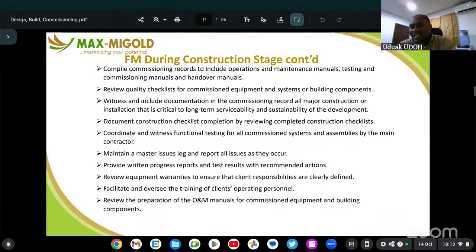It makes it easy. So that's why you need to look at the project contracts, the document contract. What do they require from us? You have to start building those documents right from the design stage, so that during construction, those documents continue, and then we can see how to update them over time. Then it will be easy for you to present. And it will always be easy for you to base your assumptions and your decisions, and see trends of what is really happening. Which floors gave issues? How can we prevent that for the next floor? Okay, the next floor is also giving issues on another aspect.